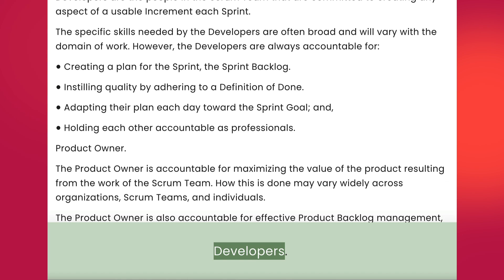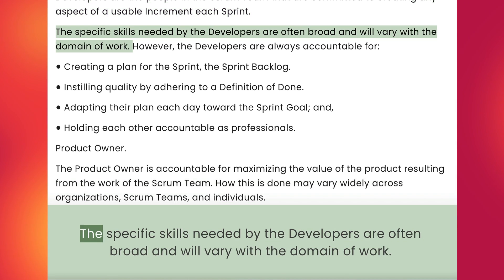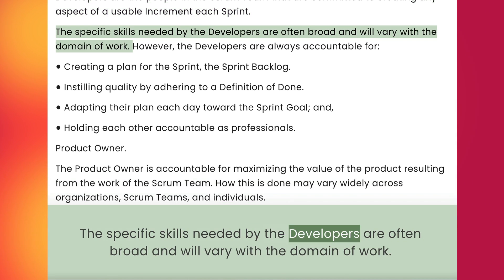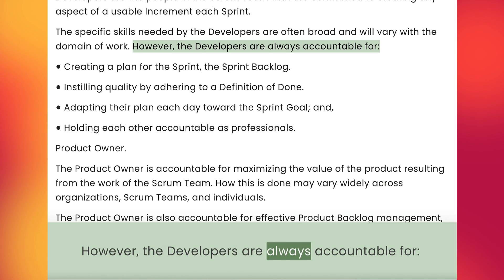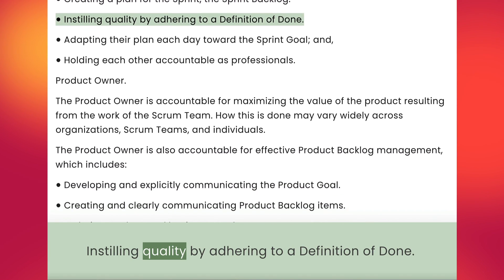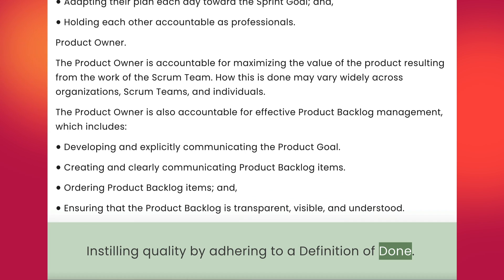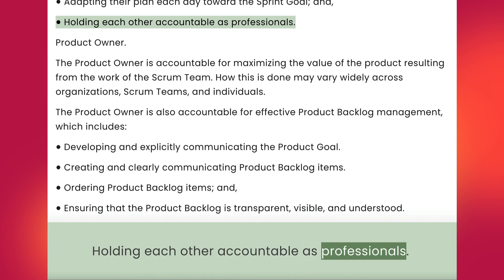Developers. Developers are the people in the Scrum team that are committed to creating any aspect of a usable increment each sprint. The specific skills needed by the developers are often broad and will vary with the domain of work. However, the developers are always accountable for: creating a plan for the sprint, the sprint backlog; instilling quality by adhering to a definition of done; adapting their plan each day toward the sprint goal; and holding each other accountable as professionals.